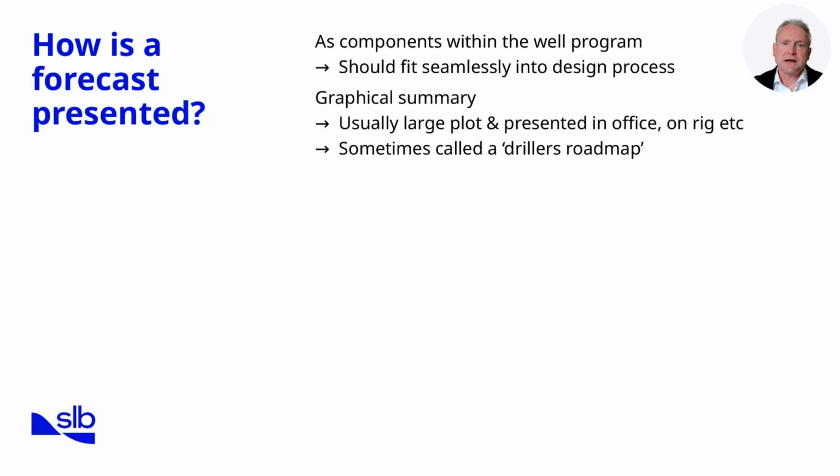Forecasts are often communicated through graphical summaries. These are usually large format plots displayed in planning offices or on the rig. The intention is to provide a clear, at-a-glance view of the expected drilling process, highlighting key risks, performance benchmarks, and contingency points. In the field, this graphical summary is often referred to as the driller's roadmap.